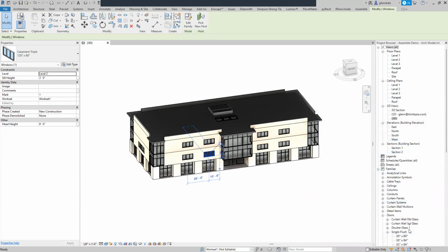Okay. So we got things going in Revit here. And in Revit, if you have those assembly codes mapped up properly here, they're going to flow for us nicely into Assemble, so you don't have to reassign them there. And the good news is if we do it right, if we create new walls using that same type, they'll already have the same assembly code because the assembly codes are assigned by type. Therefore, as you update your model, you won't have to keep on changing things because those assembly codes are going to flow forward just right out of the Revit model. So huge win as we work with this.